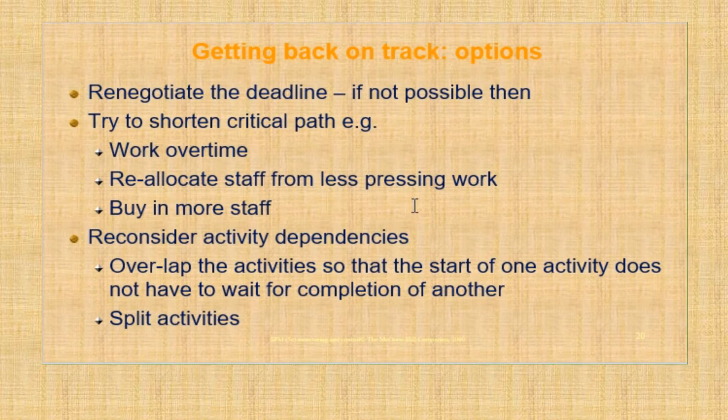Reallocate the staff. Some of the staff working on activities that are on time, or where there may be a lead time, we can switch that staff to some of the critical activities which are already delayed, and we can develop on time. So this may be another alternative.